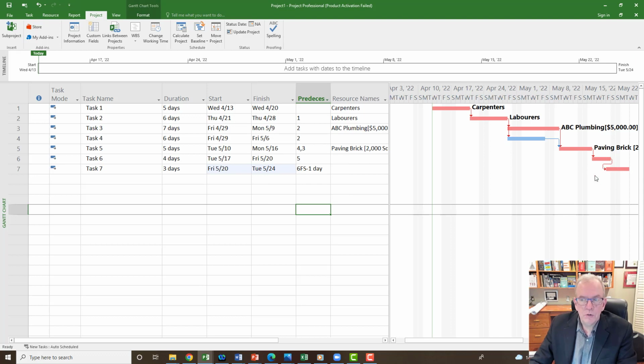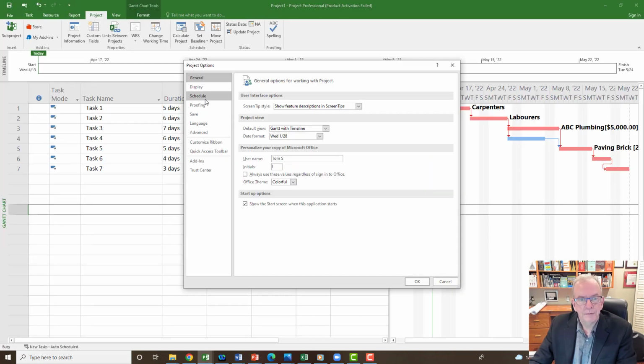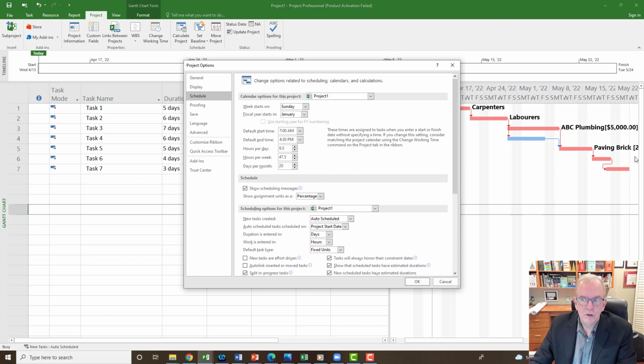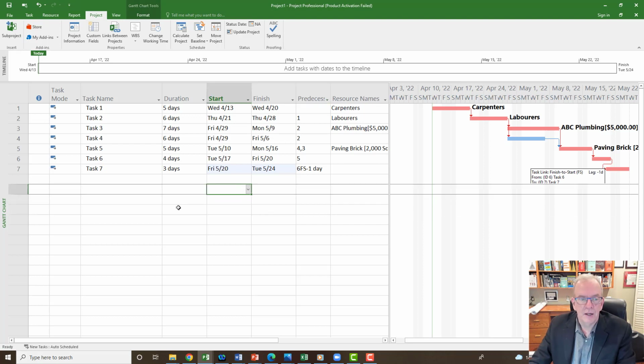You know what? If you didn't do what I just did and showed you, where we went into the file and we went into options, that's where it gets messed up, right? Like if you left this at 8 hours and you do -1 day, it minuses 8 hours, right? But if you're working 9.5 hours a day, it's going to give you all these skewed numbers and can drive you a little bit bonkers. So that's why we do this, so that this is in sync with your calendar that you created that way. So when I do -1 day, it's doing -9.5 working hours on that day, not -8 hours, which it would if you never did that adjustment.